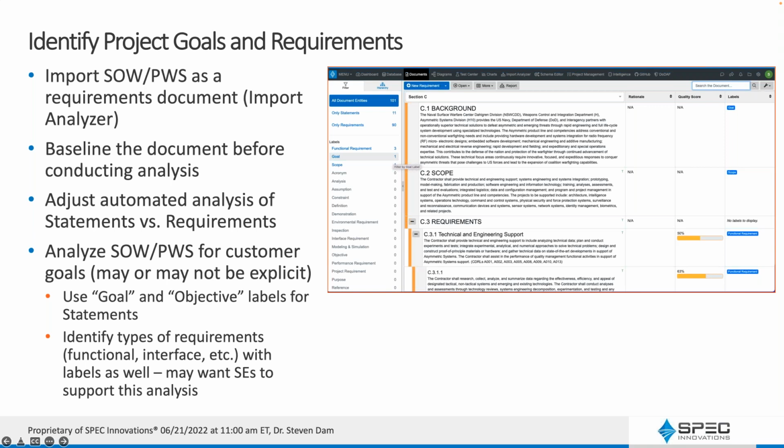Another thing that can help you is what is commonly called CYA, right? If your customer says, well, I didn't tell you to do that, and you've got it documented as a decision, and they had agreed to it, and it's clear, and you have all the information, like you captured the email or things like that in there too, that approved it, then you can put that in front of them and say, well, actually you did, here it is. Would you like to make a different decision now? So that's another conversation you can have to elegantly work with your customers on.